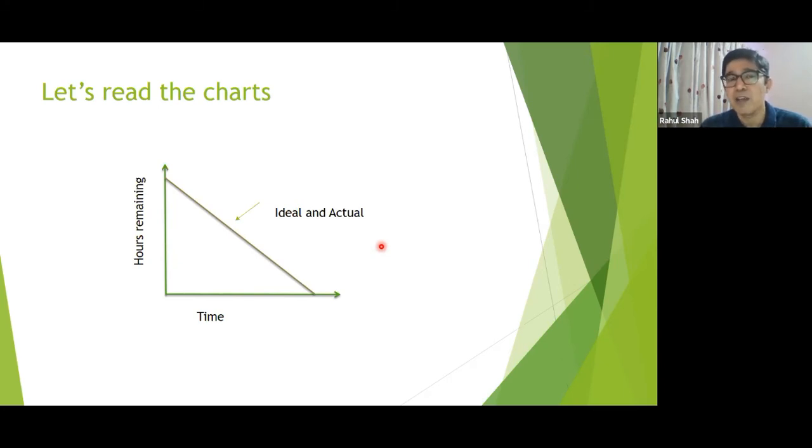This is not required when the vision is there, but how we achieve our vision is not clear. Requirements are evolving. The feedback has a very high value, and based on the feedback, many things can change. If that is the case, you use Scrum. So there is unknown. In this case, there are probably no unknowns. The love for unknown is not there. So from the positive side, if this is real, then they are using Scrum unwisely. Do you agree?